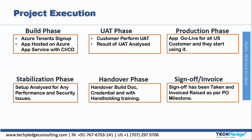After the stabilization phase, the Handover phase begins. All build documents and credentials are handed over along with handholding training. Everything is accepted at this point — the build, UAT, production are all successful, performance and security are confirmed in stabilization, and then we hand everything over.